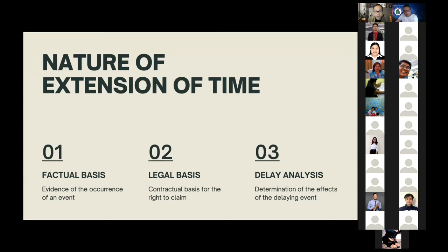The delay analysis will also lead to the determination of the quantum of the delay in terms of days, months, etc., and the cost that comes along with it, such as loss and expense and other damages that are due under the contract and under the law.